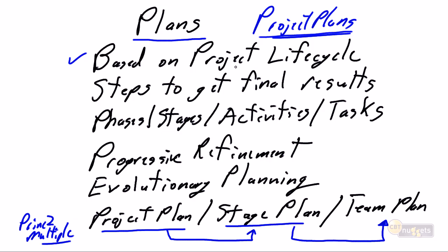And these project plans are based on the project lifecycle, not the Prince2 process model, or as Steve calls it, the Prince2 lifecycle. This is how the project is going to be delivered. Again, are we using traditional delivery, analysis, design, development? So our stages, our plans are based on the project delivery approach, not specifically on the Prince2 approach, but we also need to ensure we have time for PM.